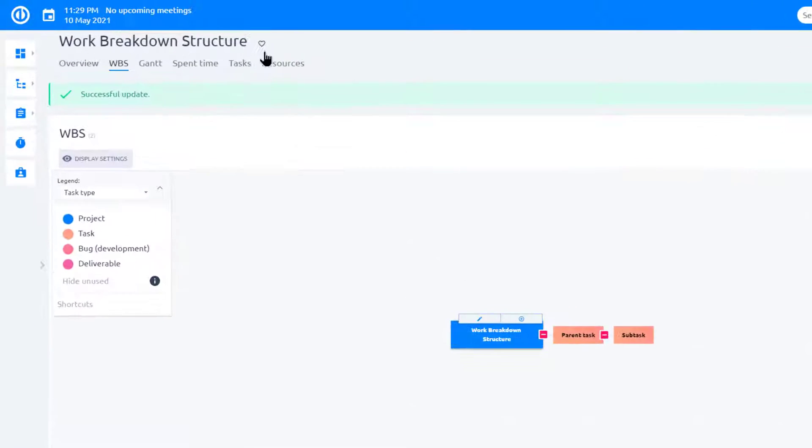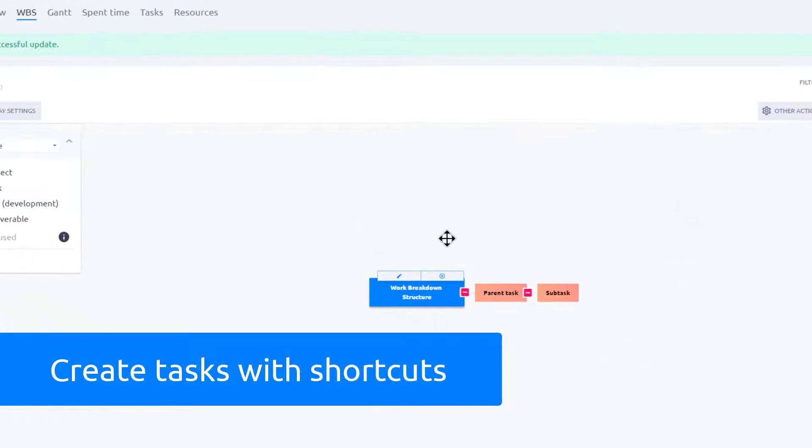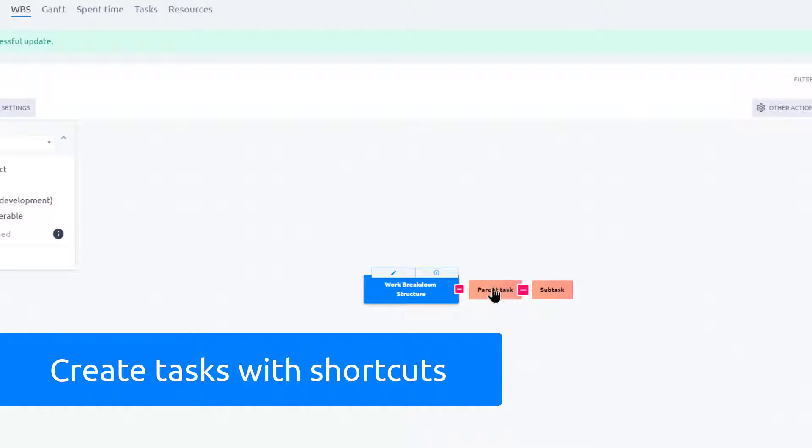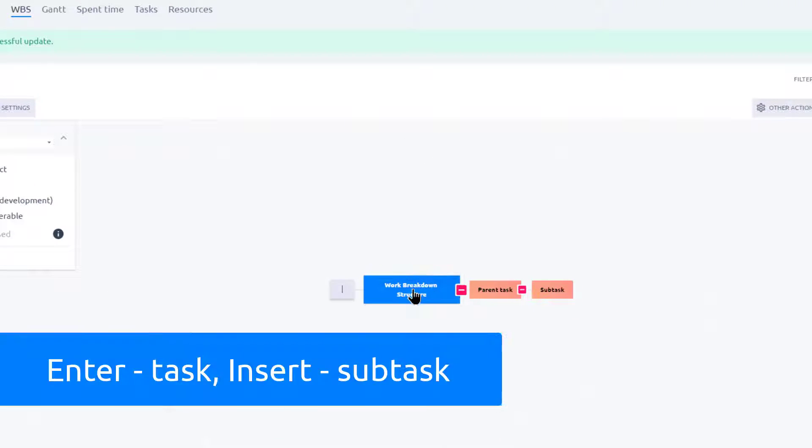Then open your project and start creating tasks and subtasks using keyboard shortcuts. Press Enter to add a task and press Insert to add a child task.